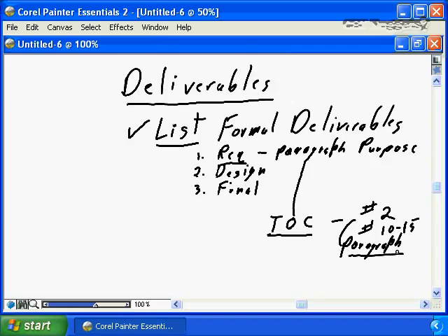It goes back to our original scope plan. What is the level of detail we need to go into for the scope definition for our project? A small one person, 3-month project? I don't believe you're going to do a deliverable definition down to the table of contents with estimated number of pages with a narrative for each section in the table of contents. That's too much detail for a small, simple project.